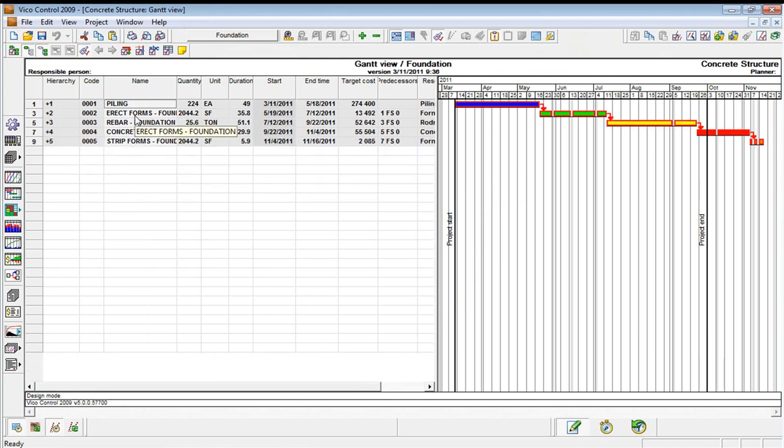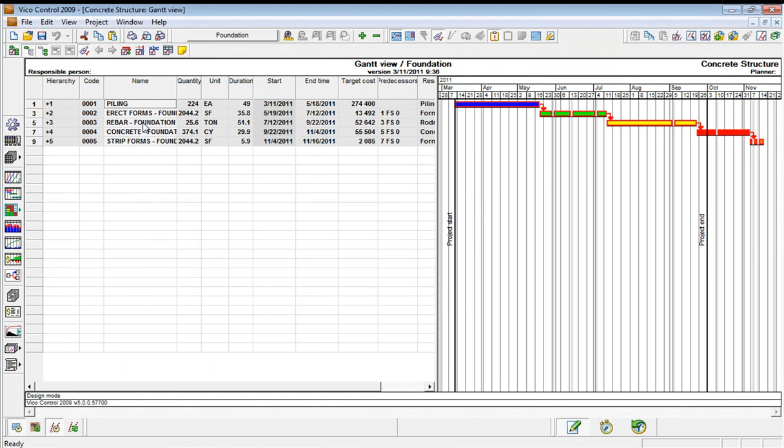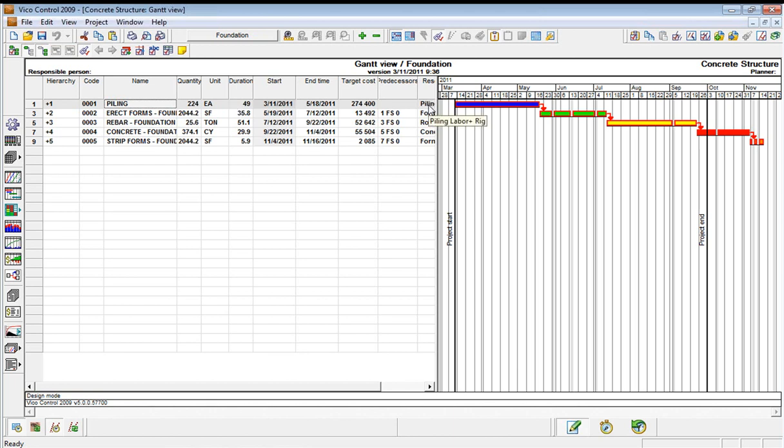We have the piles, the formwork for the foundations, rebar, concrete, and stripping, and each one of those tasks has a quantity and a duration calculated based on an amount of resource that is on that activity.